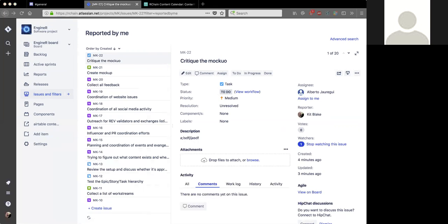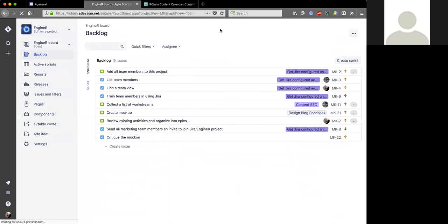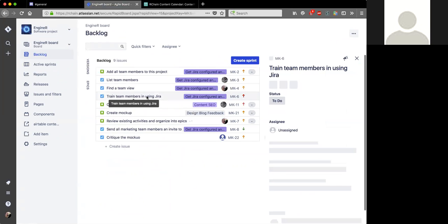So we already did our example, and the one thing I didn't do was tasks can have a subtask, which then doesn't show up in the backlog, but it is a subtask attached to the task. So if one of our tasks had, make a reservation at the restaurant, you could put a subtask on it, ask about vegan options or something like that. And that would show up for the person working on the task itself.